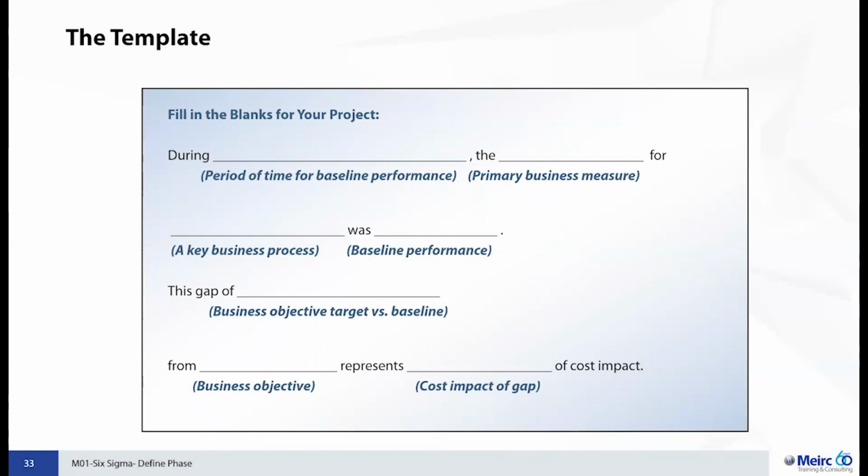Here's a template. During the last 3 months, our on-time delivery, which targets 98%, shows that we are lagging at 82%. And because of that lag, we have received 12 complaints from our customers complaining about our delays. And that is causing a potential loss of $212,000, because that represents the value of these contracts, and a potential opportunity loss of more than $1.5 million. Because remember, if you start losing customers, word of mouth will pick up very quickly, and you might start losing customers that you're not aware are no longer your customers.